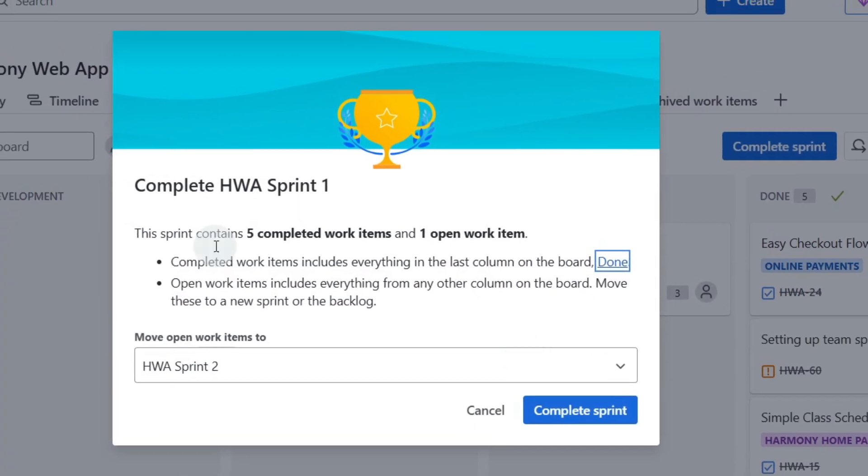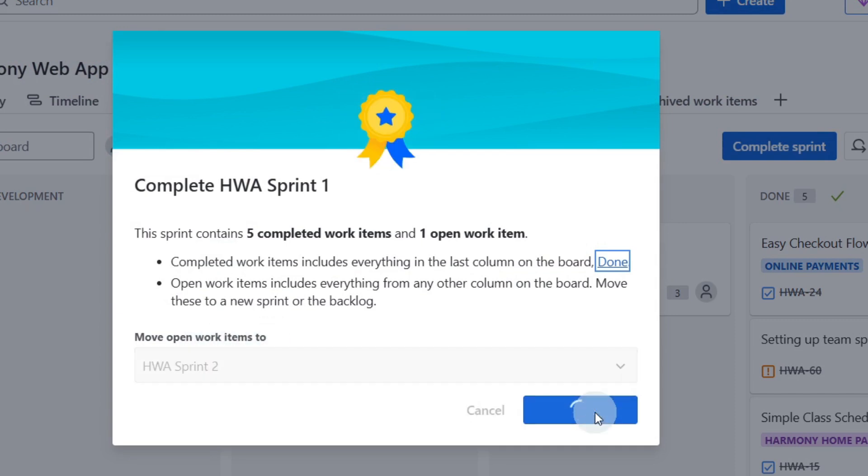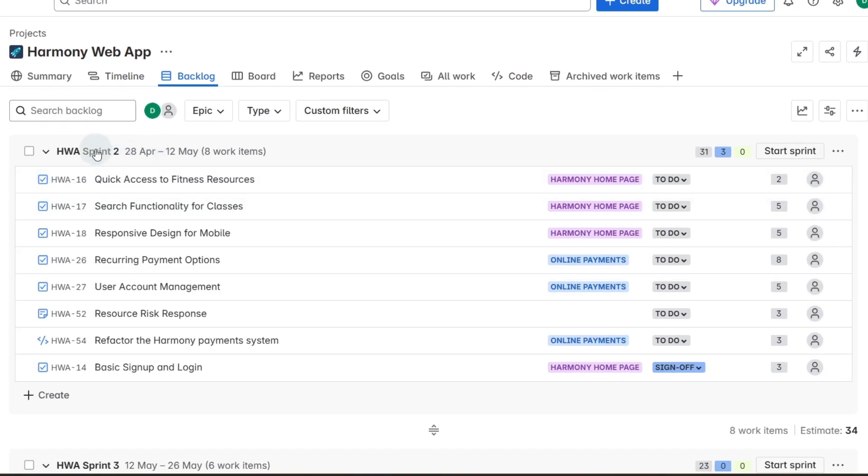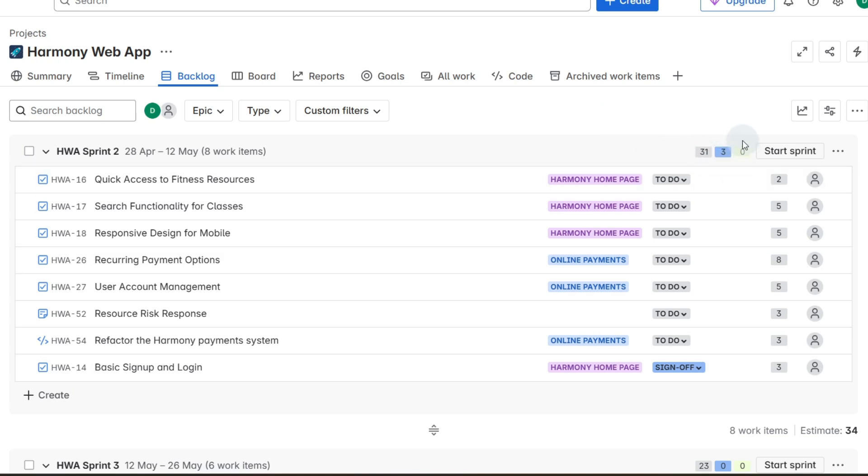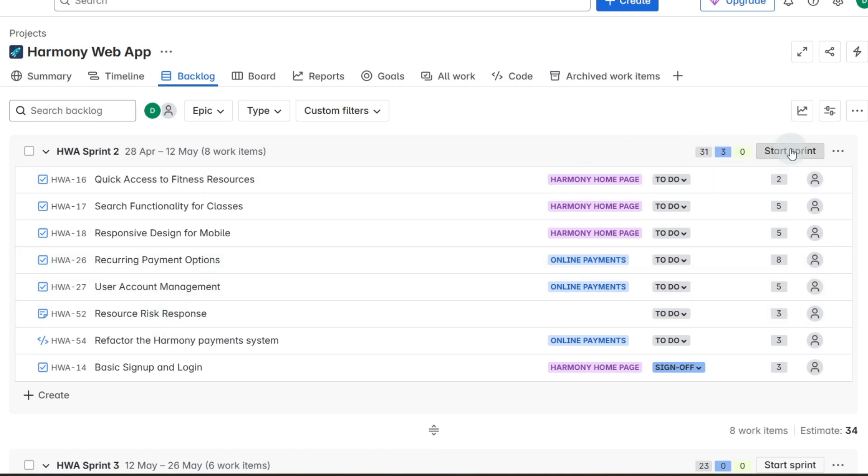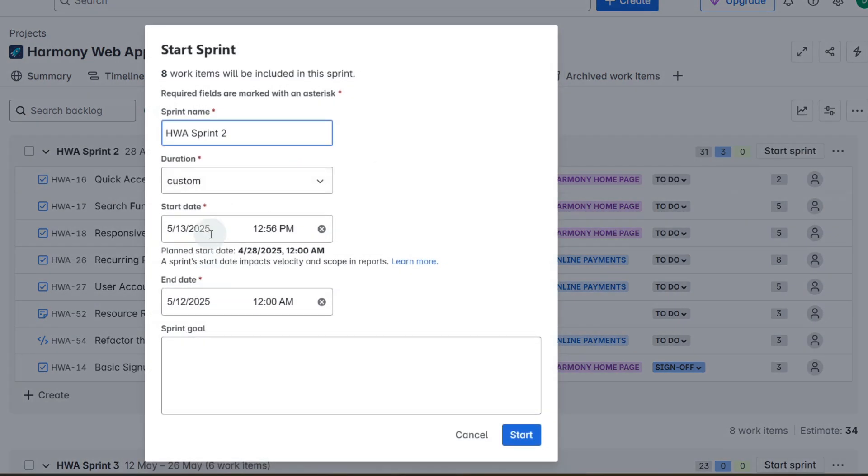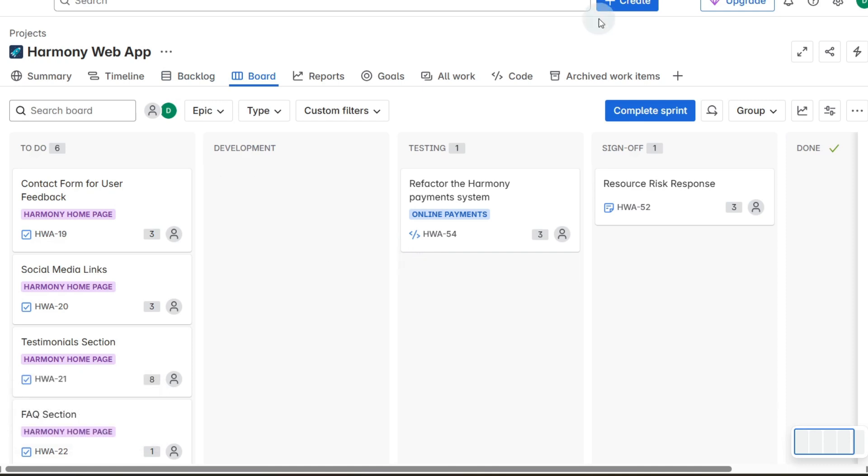Let's pretend that it's two weeks later, we want to finish the sprint, we're just going to click complete sprint. So as you can see we've got that here and we want to move any open work items to the next sprint so we complete that. Now you can see we've got sprint 2 and we've got the card that rolled over from the previous sprint, and what we want to do is if we're all ready to go and we've done our sprint planning and we're happy with the amount of user story points that we have and it's matched to our velocity and it's the highest priority items according to the product owner, then we can click start sprint, make sure the dates are correct, put in our sprint goal and start that one again.